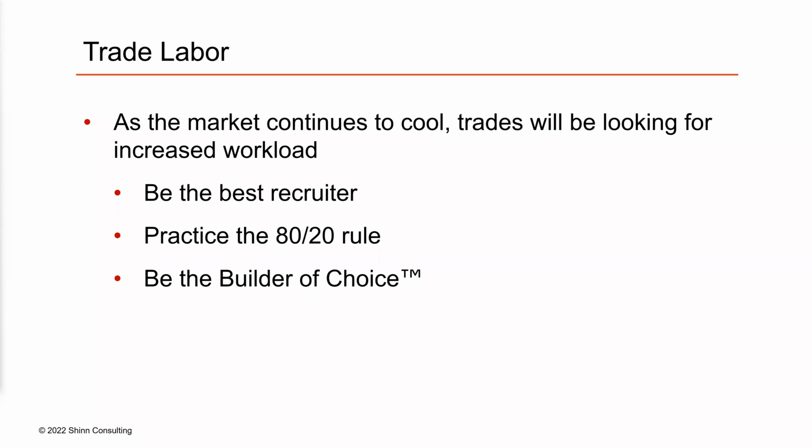Always be metering out no more than 80% to one trade and no less than 20% to another trade. When I do that, I'm creating a little competition. And so anybody in purchasing, you've got to remember, if you think there's a sacred cow, find out. Usually as we start doing this in an audit, I find all the sacred cows in operation. Well, Joe, the plumber, golfs with the owner every Sunday. Well, if the owner found out the true cost of what's going on, it's probably not a sacred cow, by the way. So really think about, how do I become the best recruiter in the market?